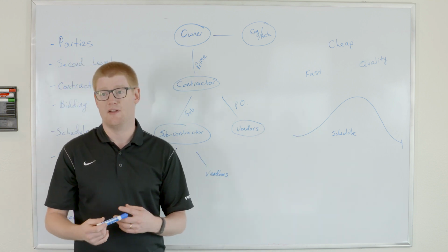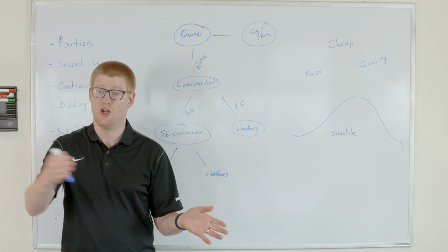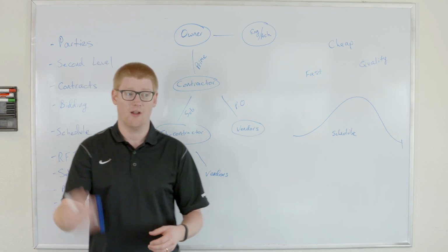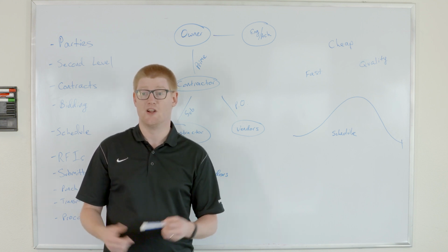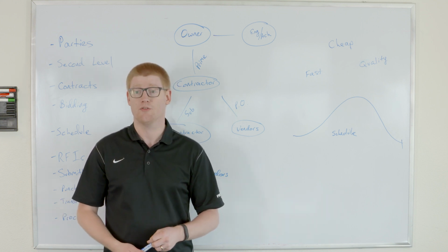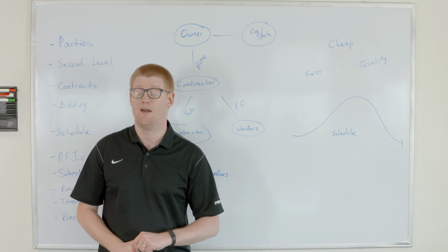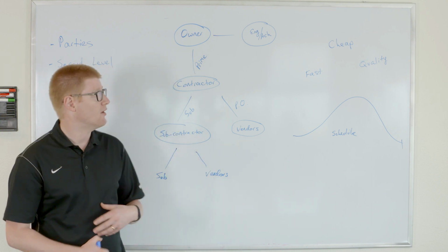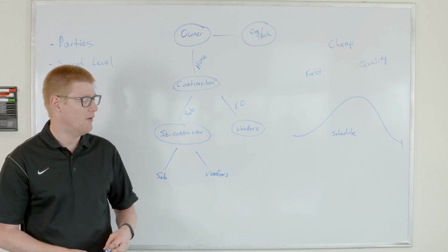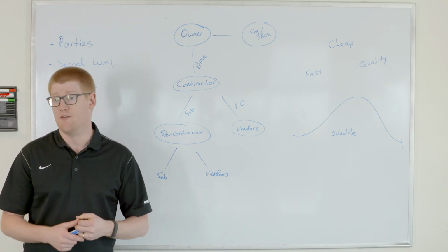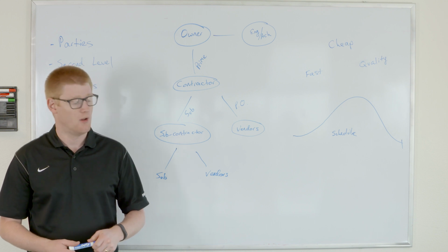And if something happens early on in a project, it can change when those target dates are. And the earlier you can plan for that, the better. Because those guys that built that chiller may hang on to it. They're not going to hang on to it for free. They're going to charge you every day that they have to hang on to that chiller and can't deliver it. So there's a lot of costs and planning that goes into a schedule, right down even to the quantities of material that's getting input onto the project.